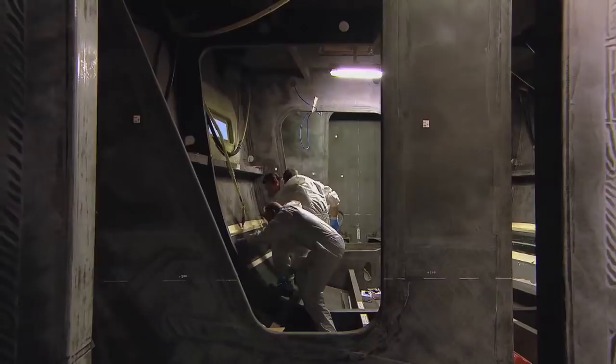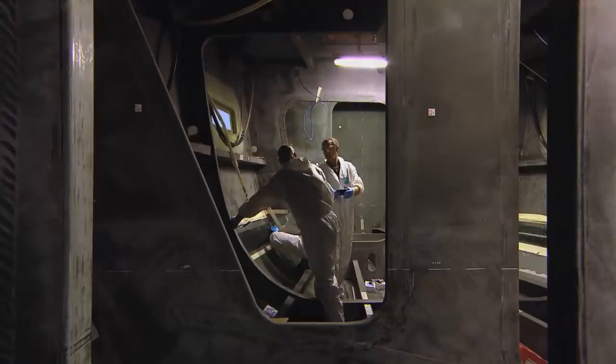And that's the bonding. The boat will be finished within around 6 weeks. Then it will be ready to ship to Holland, where we continue with building: the interior, the systems, electrics, hydraulics, painting, teak. It will be a little bit behind schedule, but we need to deliver the boat within a year when the hull arrives at the yard. So for us it's very important that this hull will be finished on time to ship to Holland.